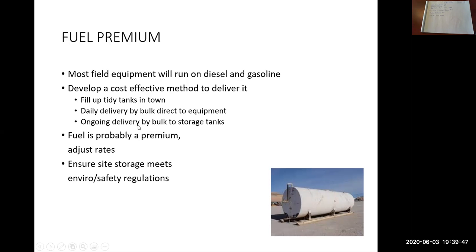Or there's another type of bulk delivery where you have an on-site fuel tank. So maybe you have a bulk delivery once a week, where this large tank is filled once a week. And then out of this tank on your job site, you fill all of your equipment. Again, there are costs for renting this tank, doing that type of thing.